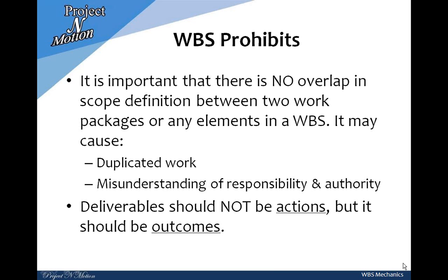Secondly, we should be careful while making a work package that it produces some output or deliverable. Only actions should not be classified as separate work packages.